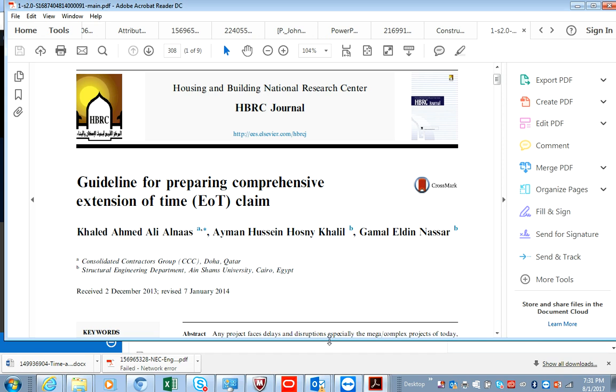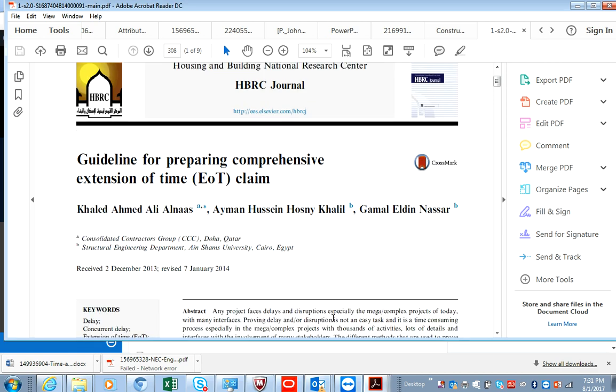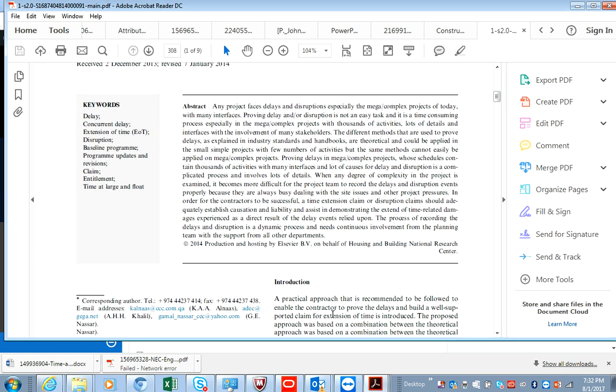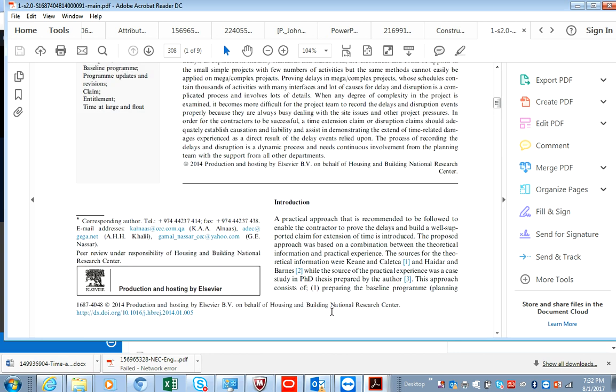Anybody? Obi? Salma? Naya? Alright, let me pull you out of your misery, right? In relation to the NEC3, you have instances where you raise an early warning notice, right? We'll literally go from NEC3 to extension of time, okay? Early warning notice is anything that increases total cost, you raise an early warning notice, right?